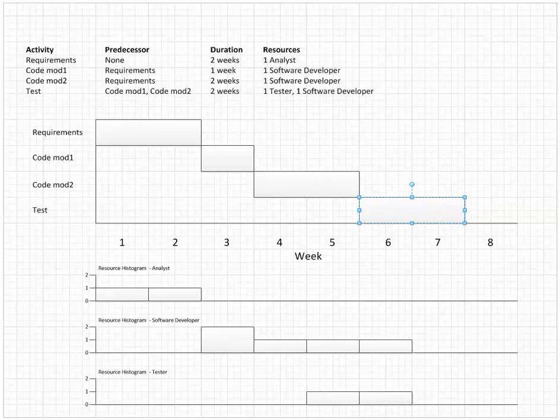Now let's talk about why we did what we did. This is not to imply that now that we have only 1, coding module 1 is a predecessor to coding module 2. In fact, this has nothing to do with this must be done before. This is just that we can only work on 1 thing at a time. Equivalently, we could do it like this.